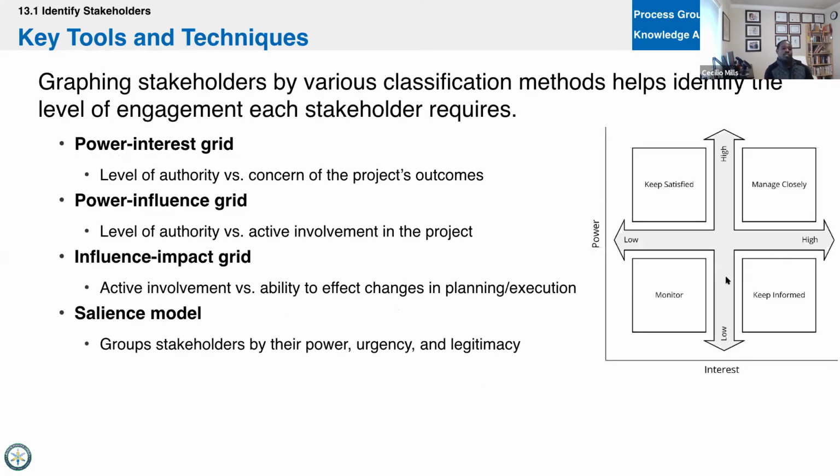So you have a stakeholder register. And so we chart power over interest, right? And so the people in the upper right-hand corner of the box, who have the most power and they're most interested, we've got to manage those people closely, right? Those are the people that want to know a lot. Think of these as your customers, right? The end client, the sponsor. You may have a person or a group of stakeholders there.